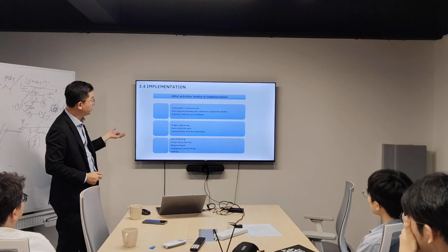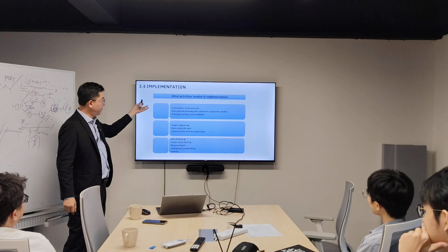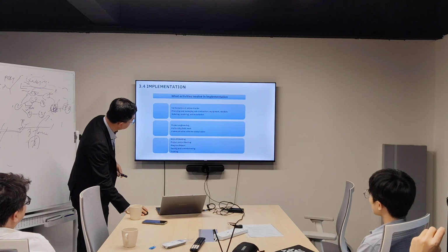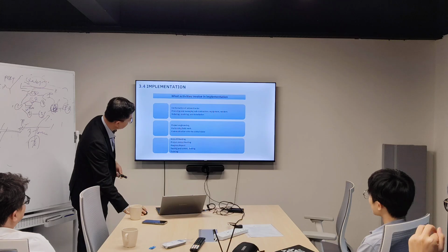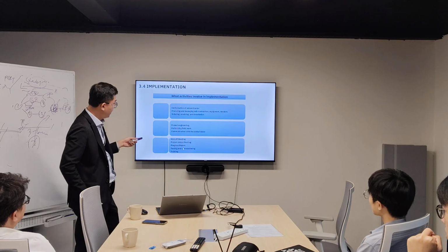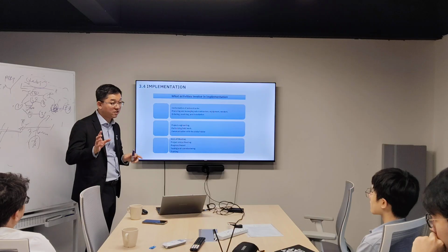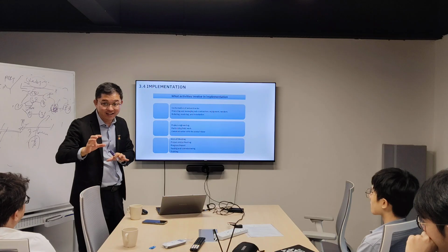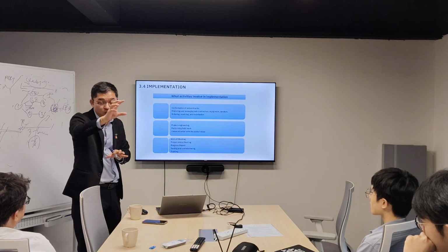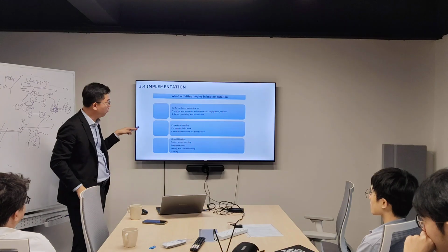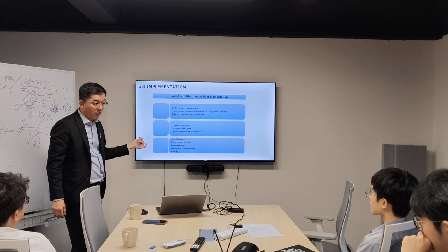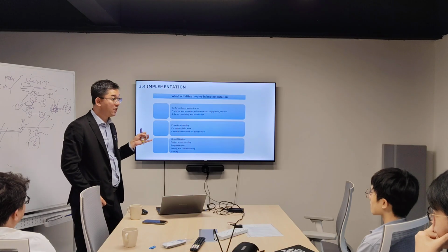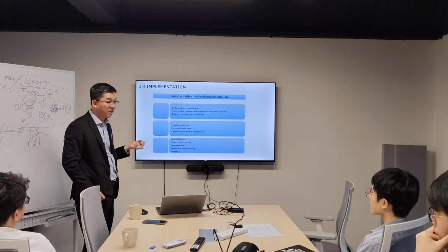So what are the activities involved in the implementation? Basically, these are all the activities. Okay. But prior to starting implementation, actually, we need to have a kickoff meeting, a project status meeting during progress, and then they need to submit a progress report. This is under the project planning stage, the communication plan. Right? Still remember the communication plan, this is what we planned. And then during implementation, we want the contractor to submit the project progress report, and we want them to attend the project status meeting or project progress meeting.